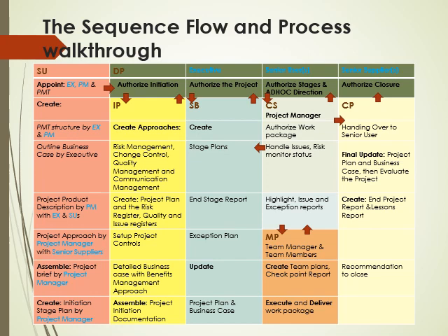We create all the documents here required to guide us to how we're going to execute the project. We always start by creating the approaches. The approaches are the approaches of how we're going to handle risk, how we're going to handle change, how we're going to handle quality, how we're going to handle communication. So we have the risk management approach, the change control approach, the quality management approach, and the communication management approach. Then the project plan and the